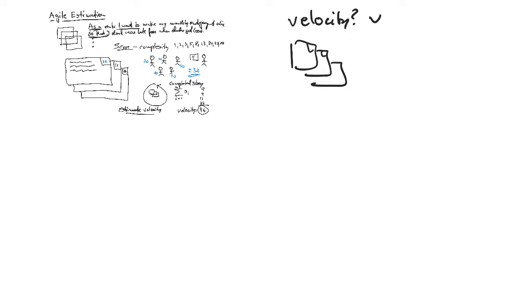They're all scored. What if I take all those story points of all the stories still in the backlog and add them up? That's all the stories left in the backlog. If I add up all the user stories, I'm going to get my total number of points of work left to be done in the backlog. That's useful.